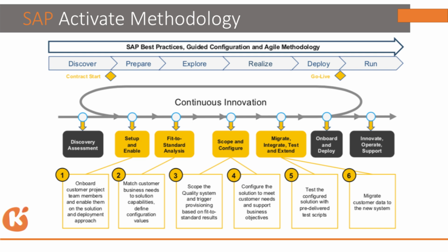There are also many integrations from ECP if you want to send any data to a third party. So we need to test configuration, functionality, integration with other modules, and API settings and integrations, everything thoroughly. Only then should we move to production. Once all scenarios are tested, any bugs we find we need to correct in the quality phase itself. Everything is fine, then we can move to production.